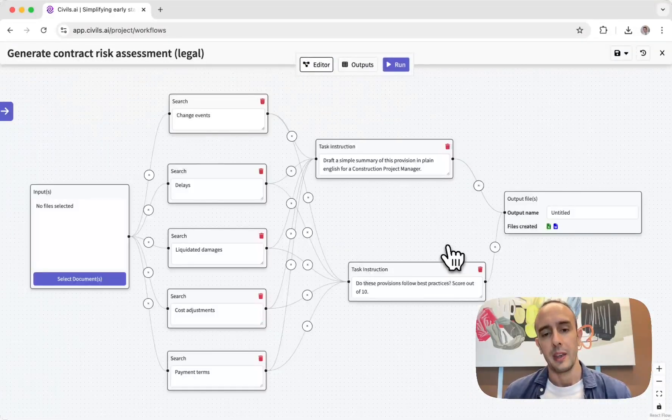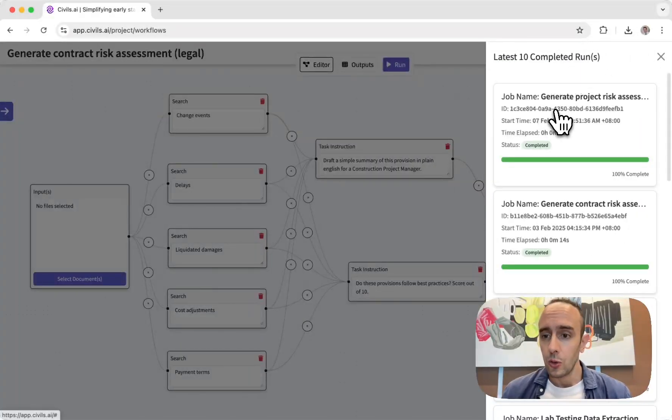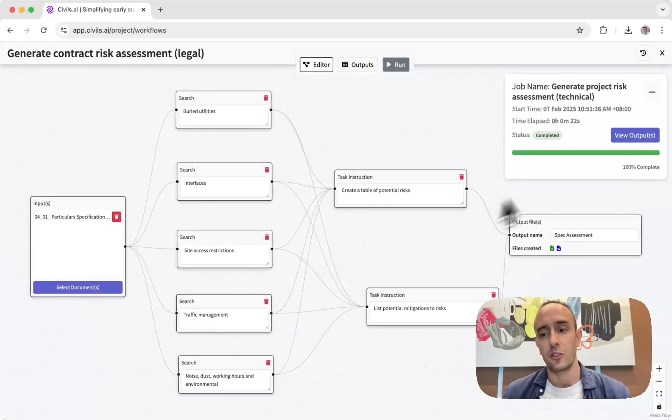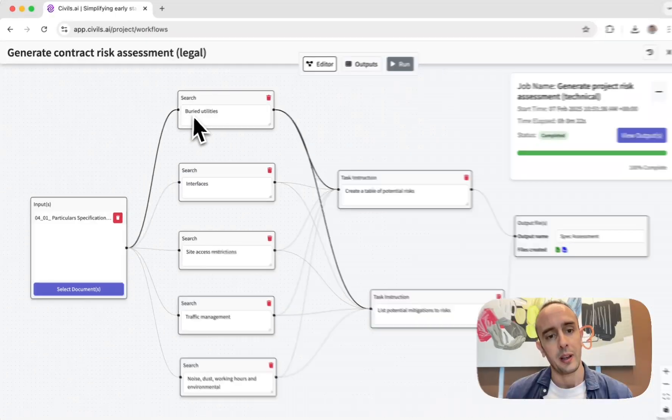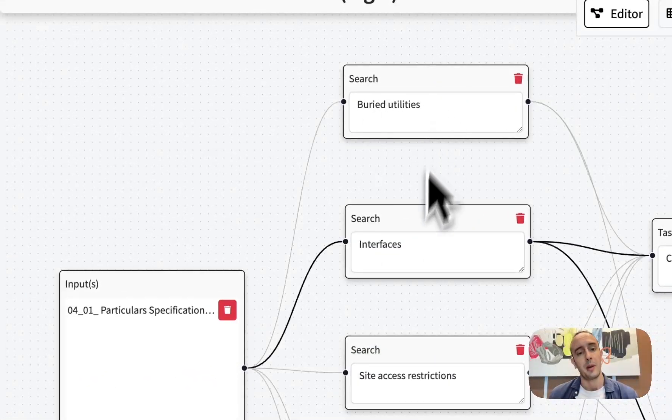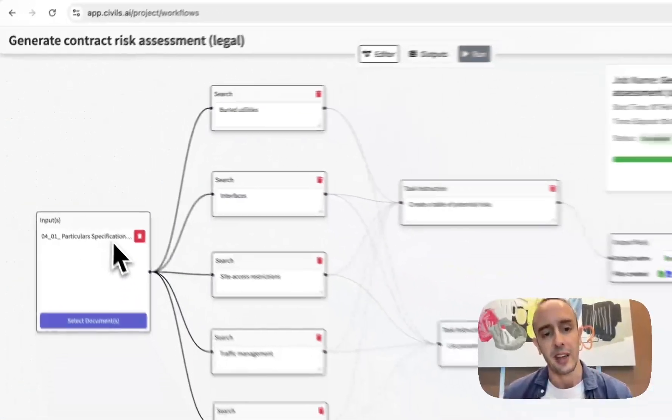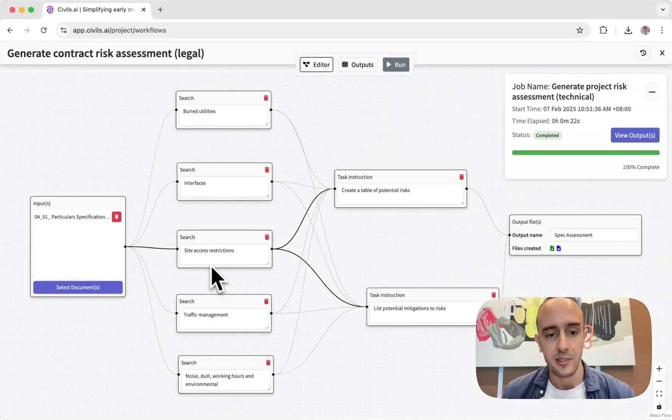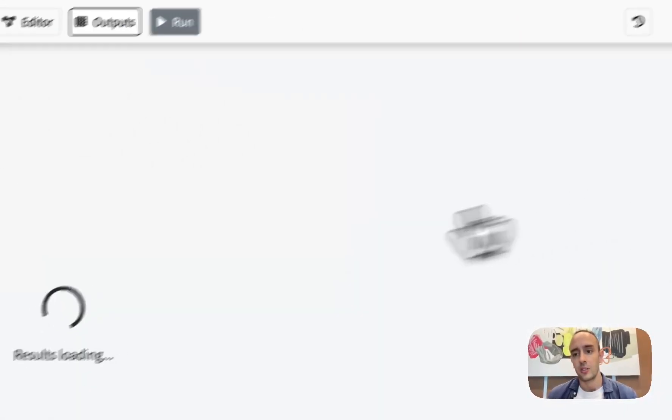But yeah, you can also run this to generate tables. So in this case I'm doing a risk assessment searching things like buried utilities from all of these specifications, looking at the interfaces, site access restrictions.